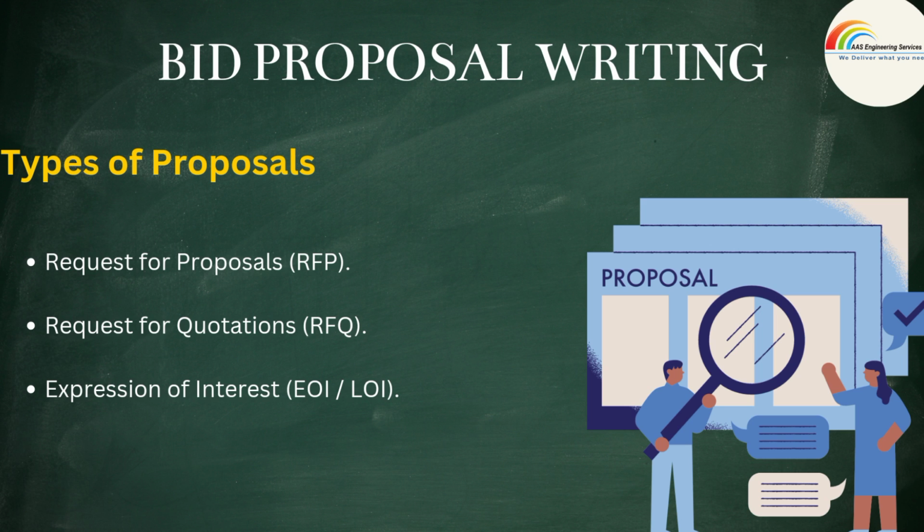Next is request for quotations. It is almost for the provision of a one-time supply of any material, maybe a spare part or sub parts of any main assembly. Once you provide it and it is properly accepted, you are free. For this purpose you only provide the quotation, not the whole plan. They want to know the quotation of the particular component, part, or item. If you have a lower quotation than the rest, and you have a strong background and history, then you can win.